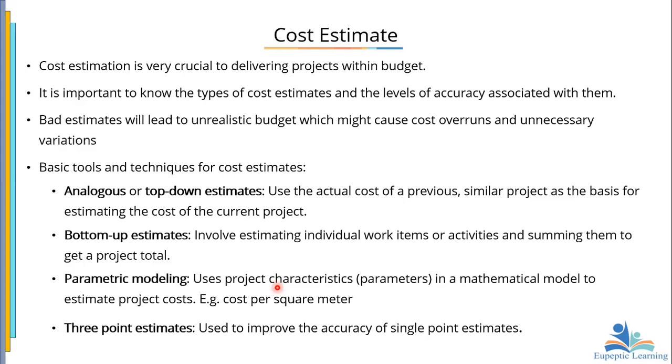Okay, so if a question asks you which of these tools will you use, there is a meeting, your top management has just called you right now, which one will you use? You see how the question is here. The top management have a management meeting, and then they call you to tell them how much the project is going to cost. You don't have to tell them to give you days to do that. If they are saying they need it now, then what you just need to do is to use the analogous estimate. Then we have the bottom-up, which we talked about.